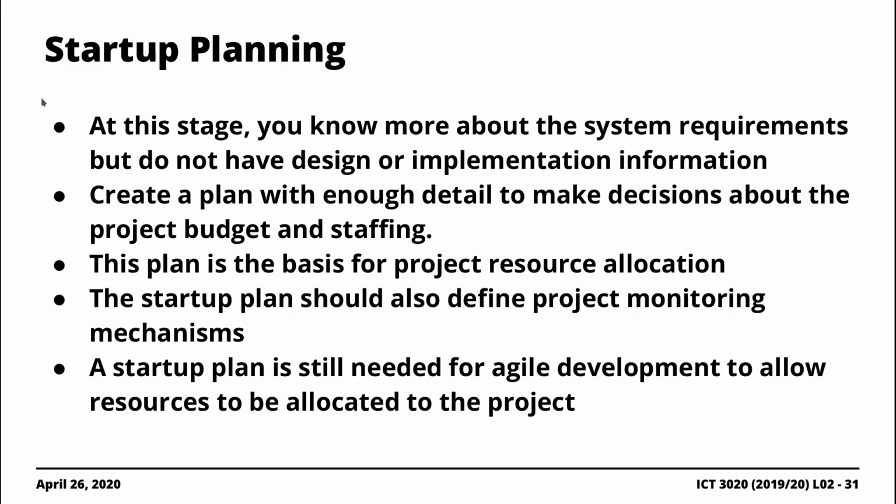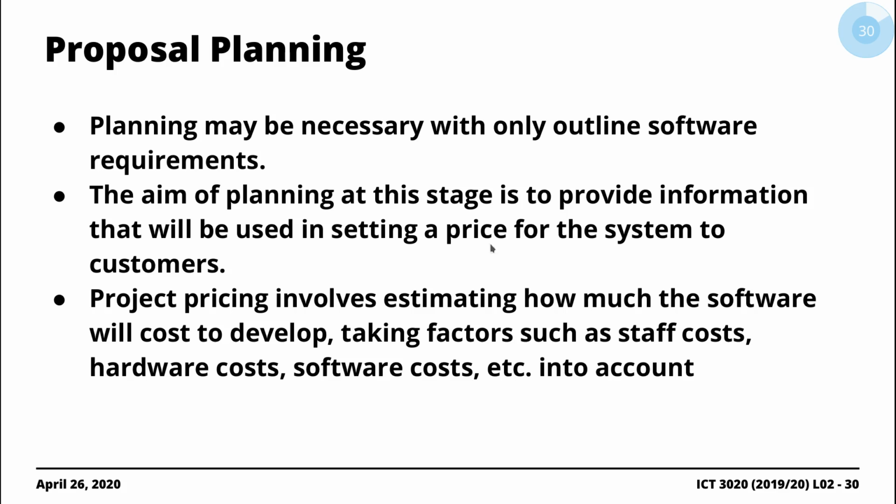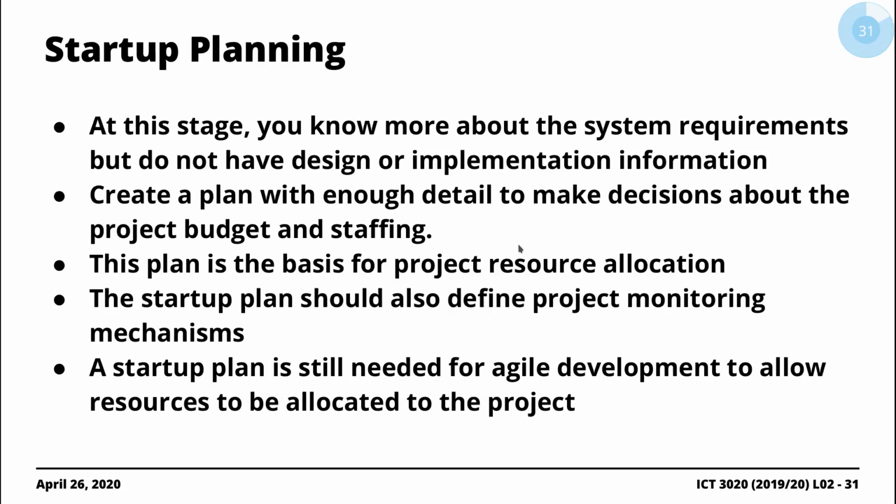The key thing here for startup planning is you just want to create a plan that has just enough details necessary for you to make important decisions about the project budget and staffing, right? Remember, the cost that you came up with earlier is just an estimate. During startup planning, you want to come up with a more comprehensive budget, right? And cost plan associated with staffing.